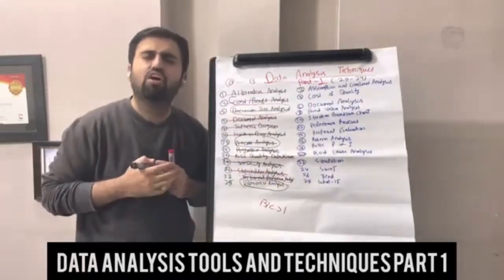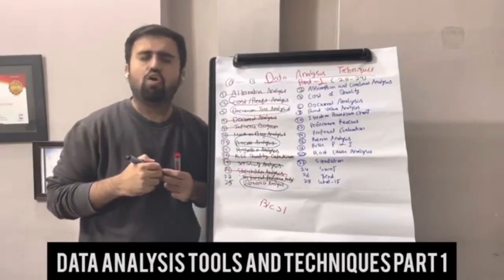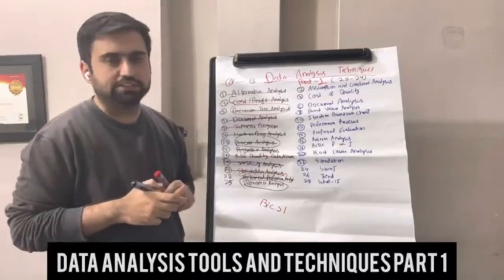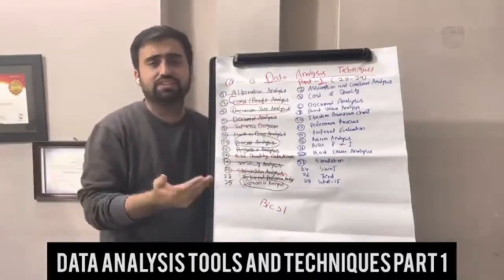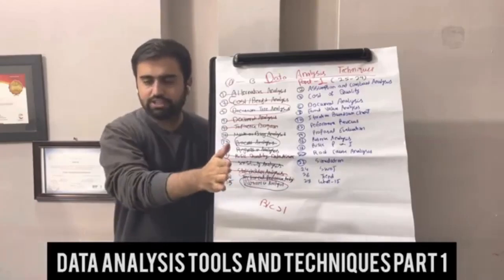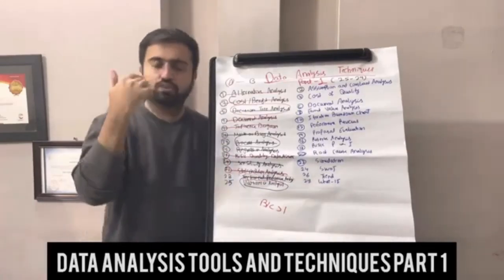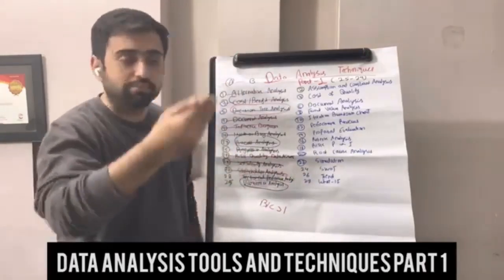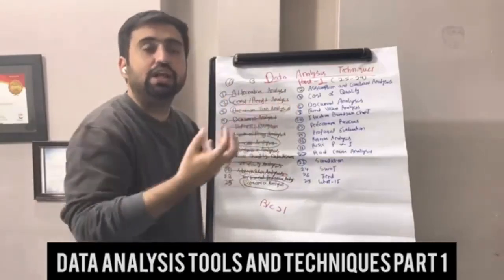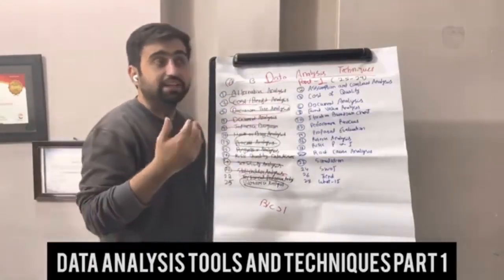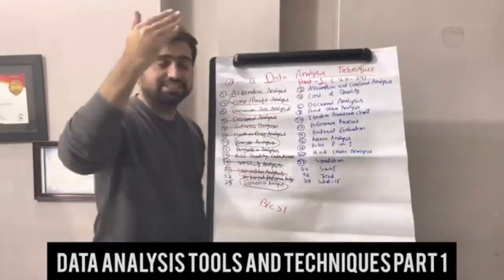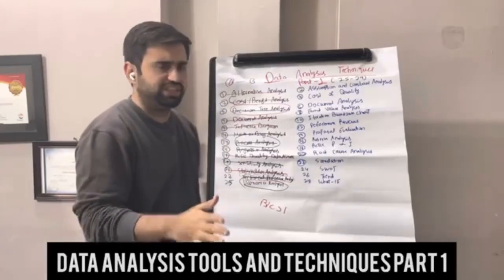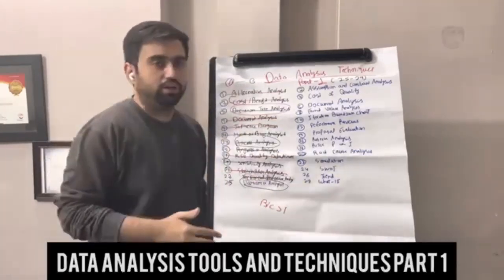The next one is one of my favorites. It is used in all of the monitoring and control processes, and in closing. Variance analysis. Variance analysis in monitoring and control is nothing but what you planned and executed, comparing plan with actual. That's how work performance data gets converted into work performance information. We are comparing planned versus actual performance. It basically tells you where you stand, all those SPI, CPI, data into information. Variance analysis is one of the most important techniques.